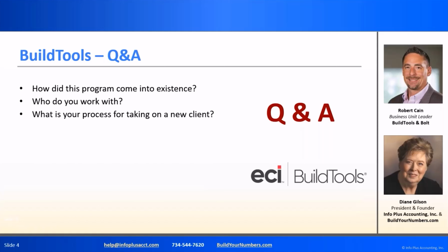Okay, great. And then to go along with the implementation, the question is, how long does a typical implementation take? Our implementation projects average a little less than 60 days. It does vary by the individual company, and one thing you can do to maximize your time, whether you're working with BuildTools or any other software, just from my experience, is have somebody in your organization that we're going to call the champion. They're the person that's going to coordinate the meetings. They're going to be in every meeting, and they're going to make sure that tasks get done, whether they're doing them personally or going out to team members to get them done.